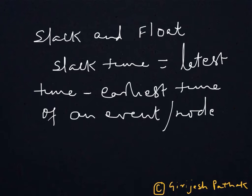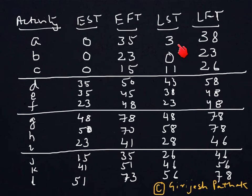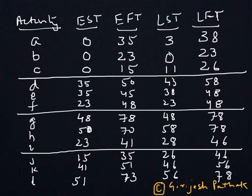Now we talk about float, which is based on activity-based analysis. For the same project, for various activities we have computed earliest start time, earliest finish time, latest start time, and latest finish time. For activity A, the earliest start time is 0 but latest start time is 3, so at the start we have 3 days extra. We can compute float using the start time or finish time — either latest start time minus earliest start time, or latest finish time minus earliest finish time. This tells us how much buffer we have in terms of time at the start or end of the activity.